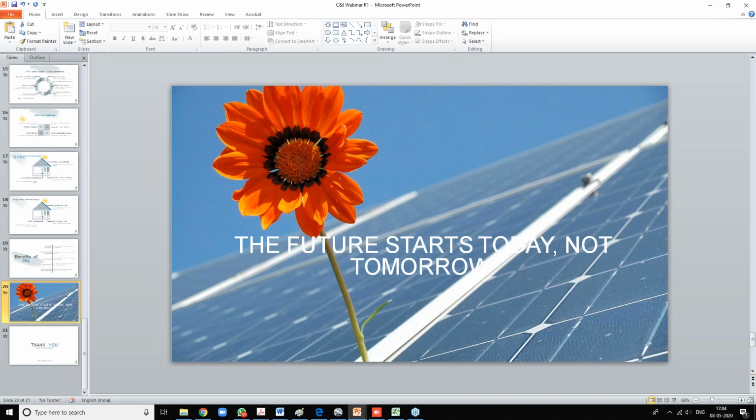Next question is from Mr. Sandesh, on the sheet. The issue is the interest rates; if we consider like 12.5, I deliberately kept the interest rate higher. So if your interest rate is 8.5, then the return expectation of the developers in India is about 14 to 16%. So the boundary line is whatever you do, your project should generate returns of something like 14 to 16%.